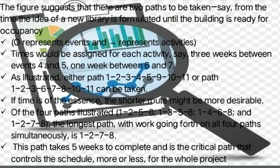Of the four paths illustrated — 1-2-5-8, 1-3-5-8, 1-4-6-8, and 1-2-7-8 — the longest path, with work going forth on all four paths simultaneously, is 1-2-7-8. This path takes five weeks to complete and is the critical path that controls the schedule more or less for the whole project.